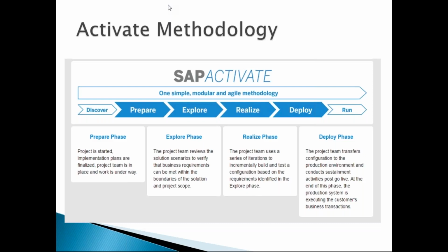So by that time, we have to make sure that at least 70% of the product is ready. And this time, the changes will be any workflow changes, any custom fields addition, small changes. It will not be a complete scratch level change again, because already we have given an opportunity to visualize in the 6th week itself, and you already saw this. So here the changes will not be complex changes, some workflow changes, custom fields, custom screens, maximum that might come, not a complete process specific change. And then coming back again to office, you work on the remaining configurations for the next 4 more weeks.